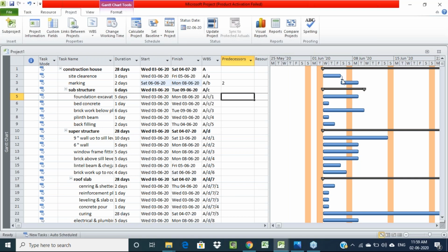So that is a finish to start type of linking, right? If you click on it, it automatically shows the finish to start type of link task. Any lagging time or leading time, if you have given it, is also represented here. Like this we can create links, or otherwise directly on the bar chart also we can create linking.